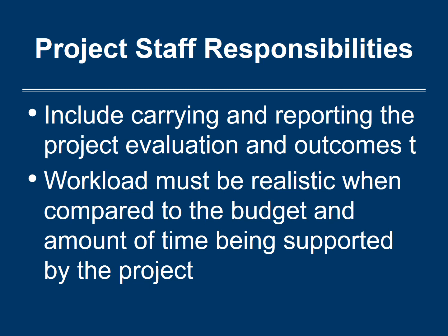You will also need to make sure that the level of work assigned each position matches with what you list in the budget section. Make sure your budget is realistic, that what you are planning to do can be done with how much you can allot for in your budget. Your proposal will be looked at in terms of how well thought out your activities are, and that you demonstrate that you can do this with the resources and budget you will have.